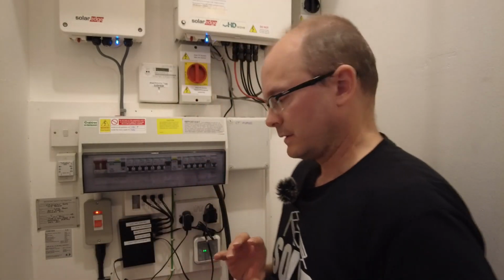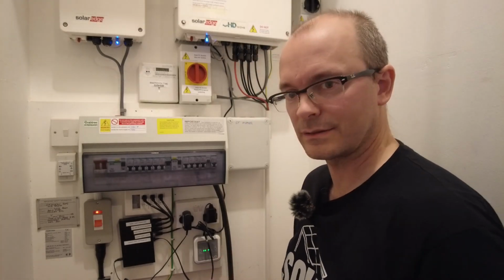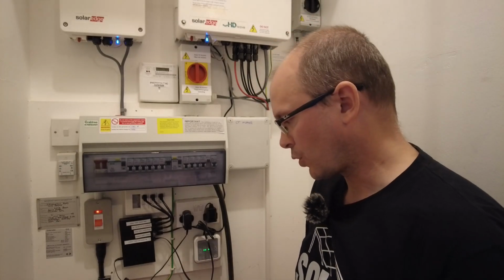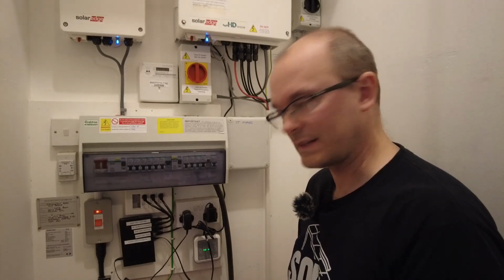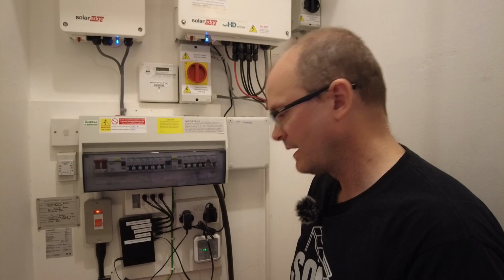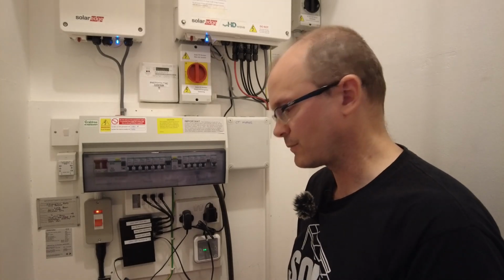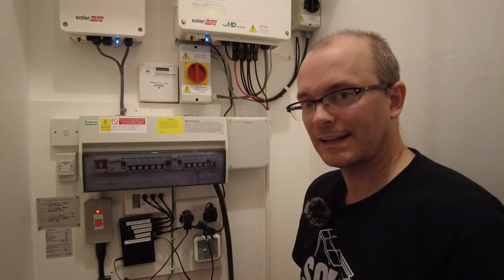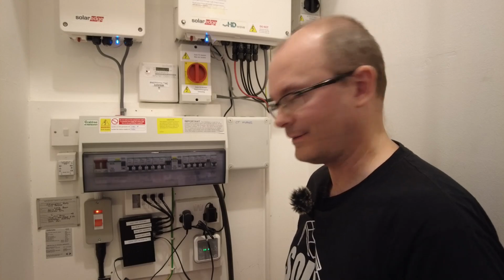Now, the warnings, they're really cautions rather than warnings. You're not going to suffer any injury here. We're not opening anything up. The cautions are that the battery must be turned off before installation, and we need to follow correct shutdown and energization procedures. So they make it very clear that any deviation from those procedures results in warranties being made invalid.